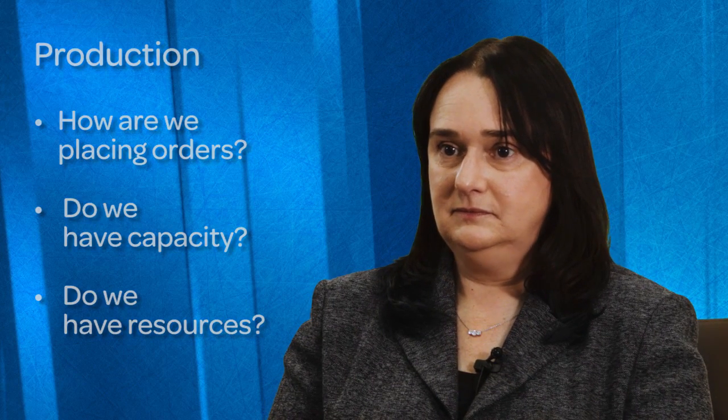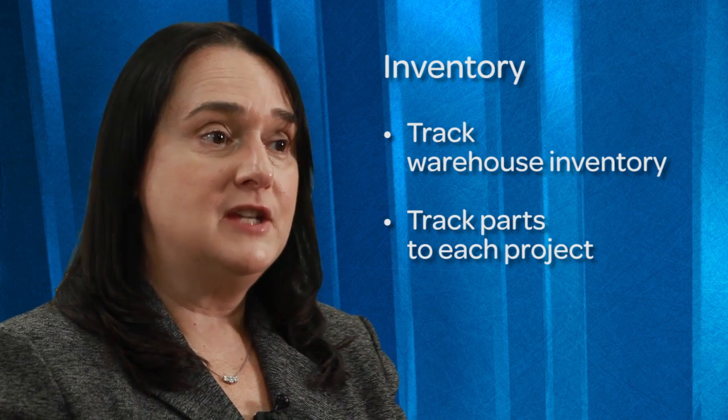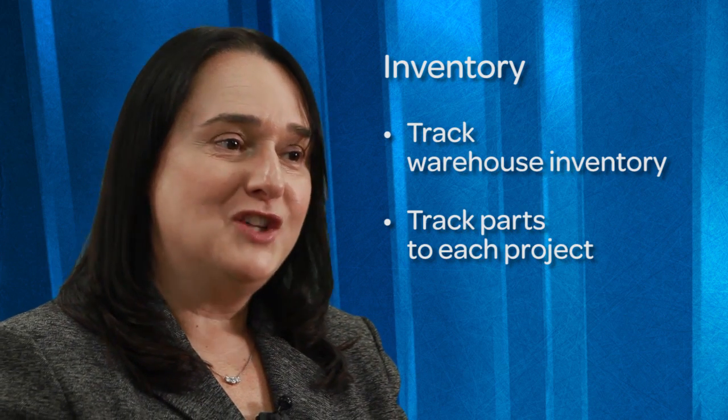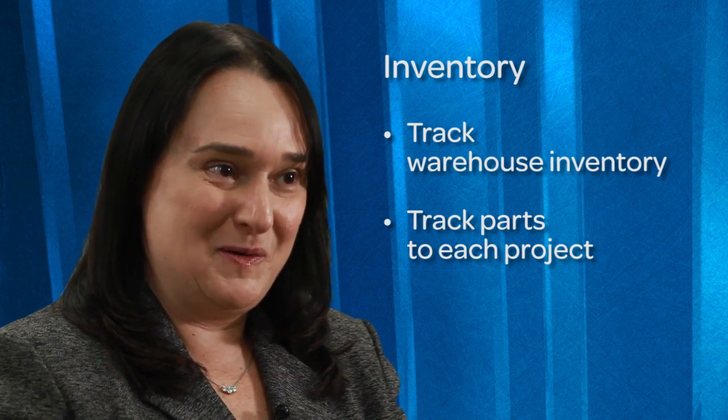Are there specific rules for tracking inventory? Inventory becomes very interesting for the project manufacturer. Not only do you have to track the inventory within your warehouse, you actually have to track each part to the project that owns that part. It adds a whole other layer of complexity to warehousing and to the stockroom. One of the 10 key elements actually states you can commingle parts in the same location as long as they're tagged to the project that owns those parts.